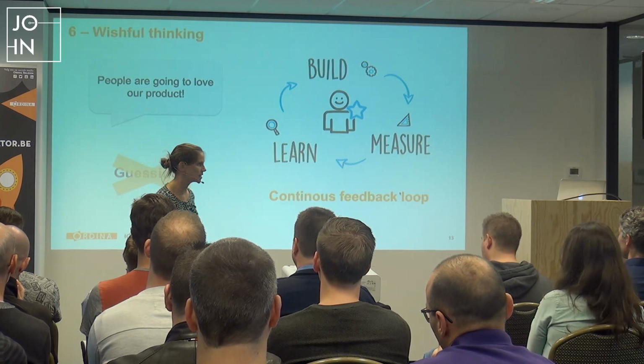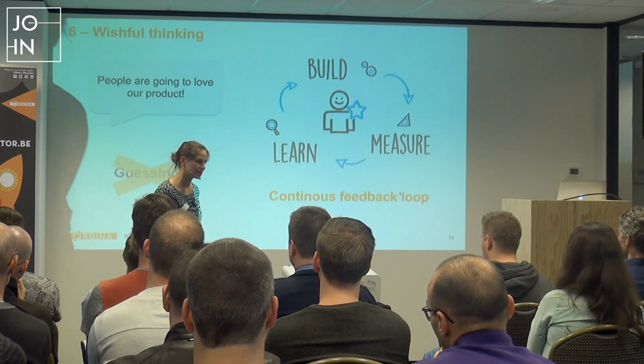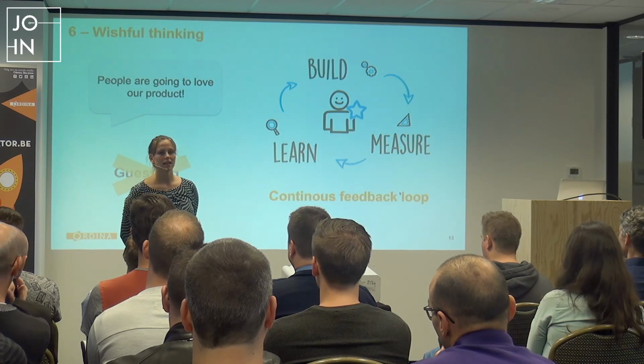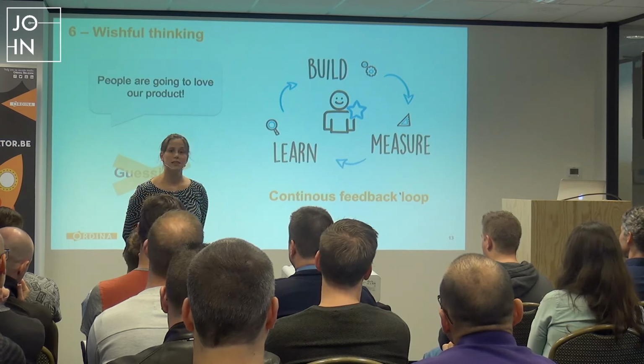Because you, as a team, have the ability to continuously monitor what the customer does with your product. There are a lot of tools analyzing user behavior in your product, or that even make it possible to test something without having actual software behind it. Mockups, A/B testing, fronts that are only a click on a website but don't have actual processing behind it. It's very easy to implement. Your product owner might not know about these technologies, but they can very easily test whether a product can be successful. So help him create that continuous feedback flow.